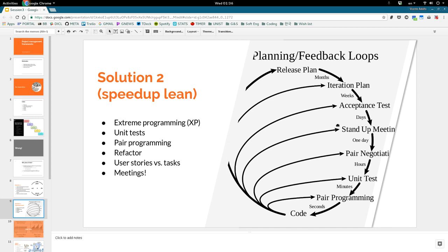And then we start the iteration every day. When you go to the office, or if you do online chatting, whatever you need, you make sure to talk with everyone in a 5-minute meeting, or 3 minutes. It's very short, just to ask everyone, how was yesterday's work? Was there any obstacle yesterday? Was there any good idea? That kind of questions you ask. It's very flexible. I read some books and they always say you have to have 3 questions. No, it can be anything. The main idea is to make sure what happened in the previous day and the plan for the current day. So that's the 1-day level, and then there's the hourly level. Let's just forget about this part right now.